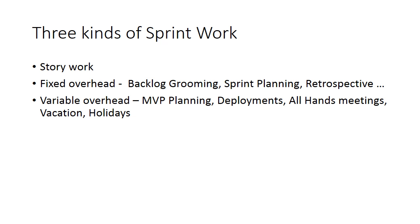There are three different types of work performed in a sprint. Story work, which can include user stories, architecture stories, technical debt, and so on. There is also fixed overhead, which is work that happens on a consistent basis across sprints. This may include things like backlog grooming, sprint planning, retrospectives, and so on.